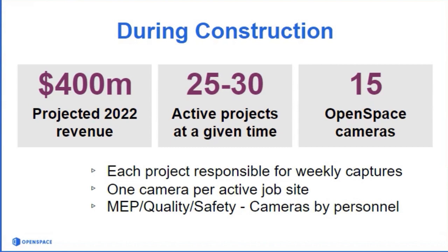If there's something specific that they need to capture, for MEP, which I'll get into a little bit when we talk about the BIM compare tool, they'll go out the day before an MEP coordination meeting and just capture what's installed. It uploads overnight, and it's a good snapshot that they can bring up at the meeting instead of having to go out, walk out on site afterwards, and they can use the BIM compare tool for that.